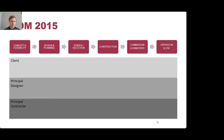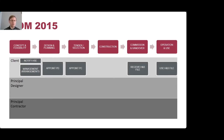CDM covers three main duty holders: the client, the principal designer, and the principal contractor. The client has legal duties to notify the HSE — the Health and Safety Executive, your equivalent of OSHA — and must put in place management arrangements. The principal designer and principal contractor are legally appointed, and the client must ensure through these management arrangements that all parties are undertaking their legal duties — quite a significant legal duty on the client or owner.